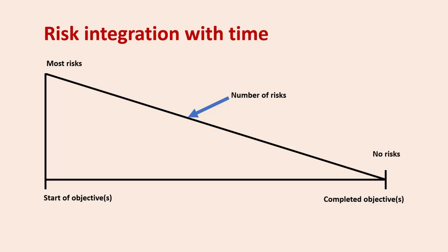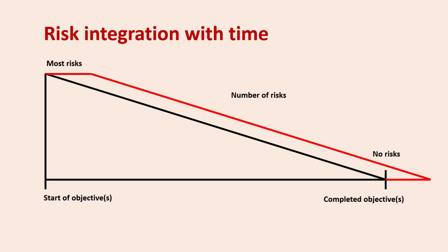Consider this larger diagram. Put simply, if risks are not identified early or their management is poor, then activities will slip, and at the very least, the time component of the objective will not be met. Hence, starting risk management early, followed by ongoing proactive management, is critical to achieving objectives.